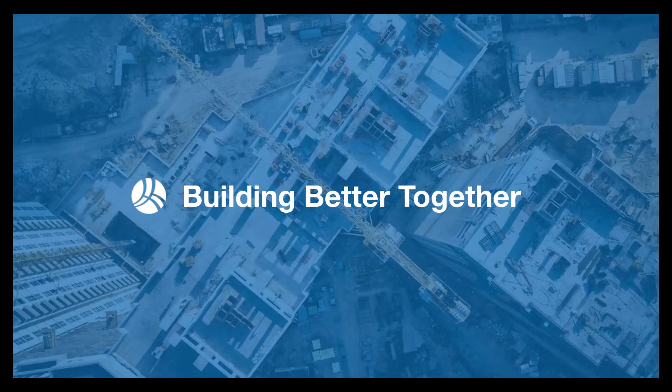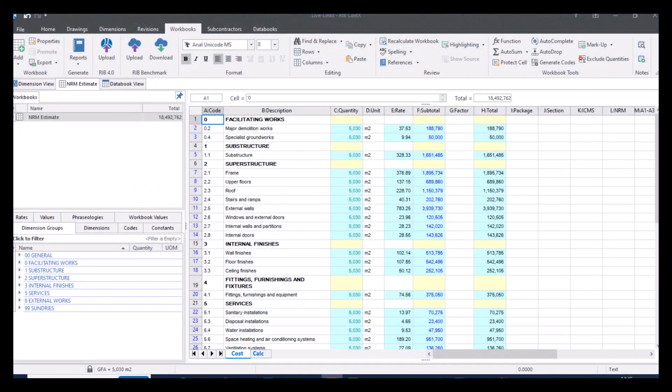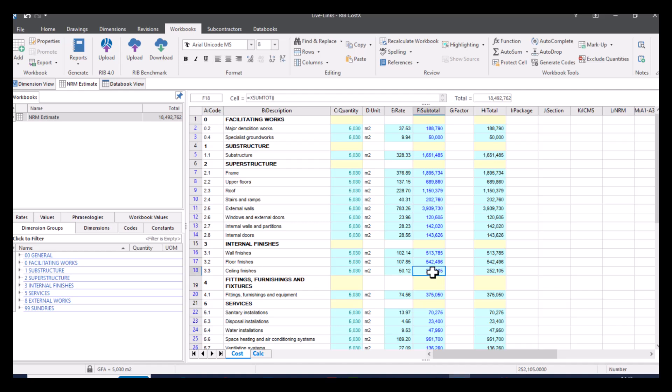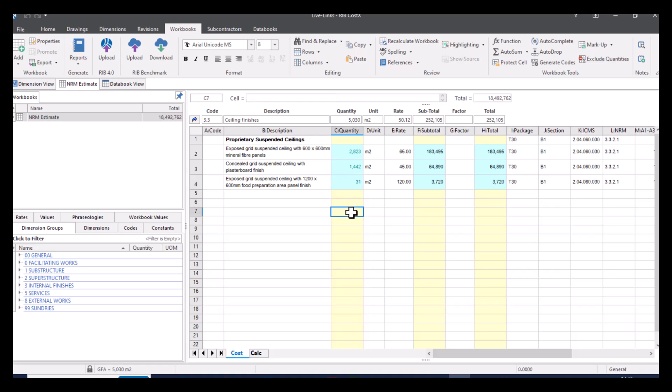So let's take a look at the functionality of live links in workbooks. One of the first ways we can have a look at live links is from a dimension group. So this will be to do with your quantities. The benefit of having the live link connected to your dimension group is that any time it's updated or changed, then your workbook is automatically changed as well. So I'll show you how that's actually created. If we go into one of our elemental items, for example, let's go into ceiling finishes. I'll double click in here and you can see we've already got some quantities in here. And as I said in the presentation, anything in a green text means that it is live linked.